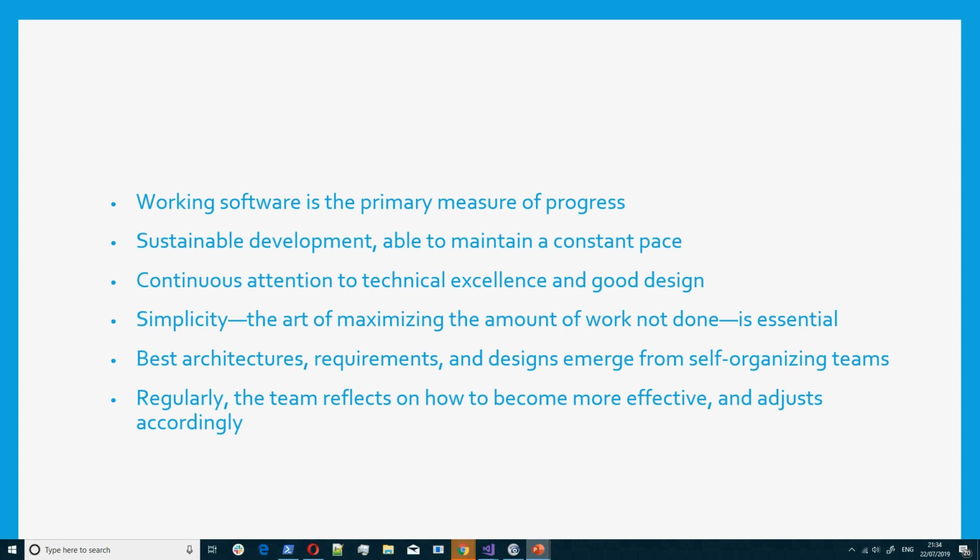This is one of the ways to measure progress, that at every particular time you are delivering something that is deliverable, that is usable. So you would be having a working system at every particular time or at the end of the sprint. That is how to measure the progress of the application. Working system could mean that we've already finished this particular card and we've delivered it. So it might be useful to a tester or developer, but you have something that you can deliver at the end of the sprint.